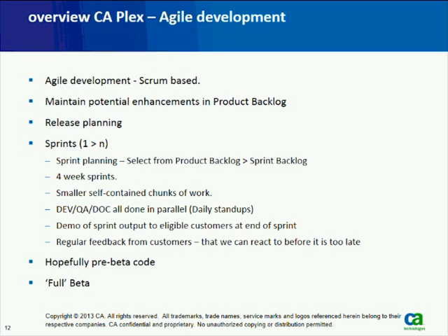Then at the end of that sprint, we end up with a deliverable that we can supply to customer stakeholders to review those features, and hopefully even give them a copy of that functionality that they can install and start using in their environment. That will be pre-beta code, so it won't necessarily be supported in the traditional sense through our support mechanism, and it shouldn't be used in a production environment, maybe if it's a runtime feature. But at the same time, you get early access to that, like a community technology preview or an alpha build.